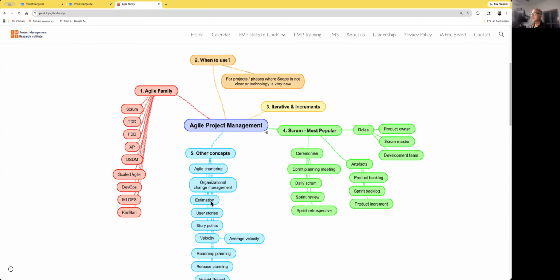In Agile, we always start with the product backlog. Under the artifacts, we discussed the product backlog. Then we elaborate the entries in the product backlog into detailed requirements. We call them user stories, and the stories get estimated. Weightages from the Fibonacci series, like 0, 1, 2, 3, 5, 8, 13, 21, get allocated to the stories during estimation. We call these story points.